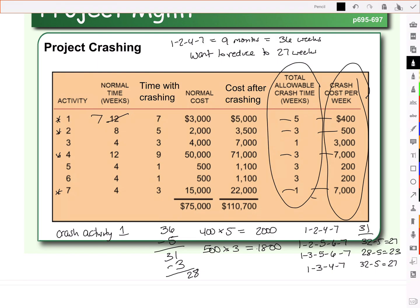The problem is we're not there yet. We're trying to get to 27 weeks. So we're going to need to crash another activity. Activity 1 has already been reduced from 12 to 7. Activity 8 has been reduced down to 5. And so now we need to figure out which activity next to crash. We go back again to our critical path and make sure the critical path hasn't changed.